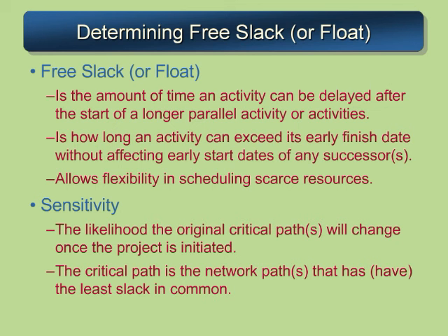Project sensitivity is the likelihood of the original critical path changing once the project's initiated, and it also looks at things like whether there are lots of critical paths within the network and where they merge together or are separated. So basically, when you've got critical paths or a lot of near critical paths, your project network is considered highly sensitive.